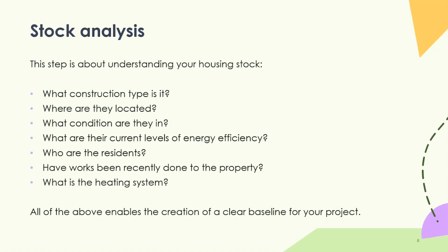When we think about this, though, it's also good to think about how that aligns with your existing programs. So if you've got a boiler or heating replacement program, making sure that you've understood the data behind that as well. All of this data collected and collated will really help give us a better idea and a baseline of what properties you can start to include within your program. So you start with a big pool and then you slowly start to narrow it down and cut it out to refine different funding requirements such as SHDF.